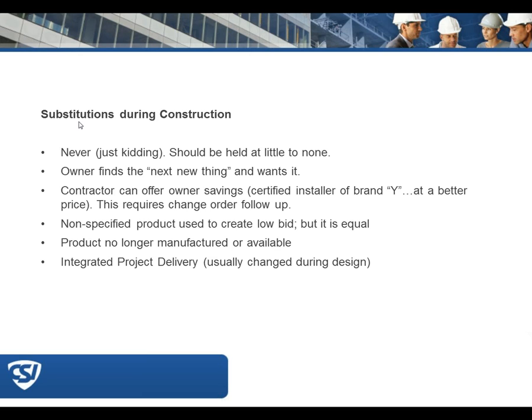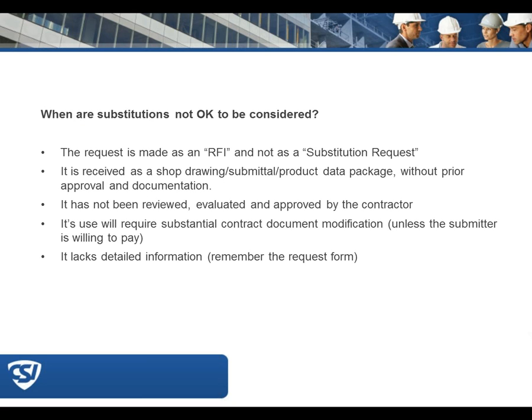And then lastly, with our comment we were talking about with the HVAC not fitting, what happens if it does get approved and the equipment is delivered and doesn't fit? What is the architect or engineer's recourse? I think Jim touched on that previously. If you've gone through the process, the contractor certified that it fits. He's doing that when he submits a substitution request. That's the language that's on there. Then at that point, it becomes his problem to fix, and if that means he's got to go out and get a different piece of equipment, he's got to do that at his cost. That's right.